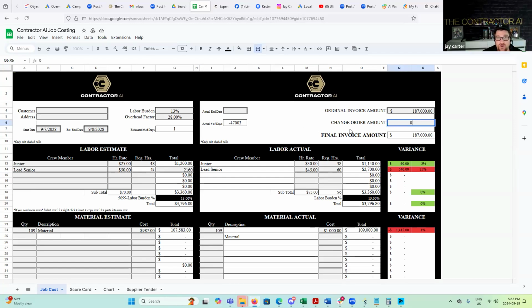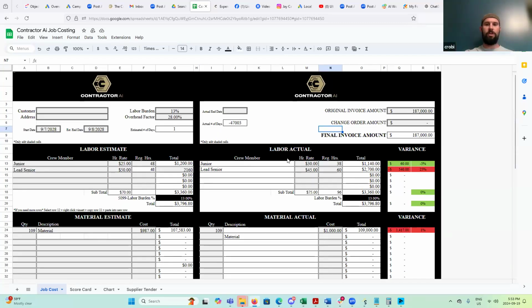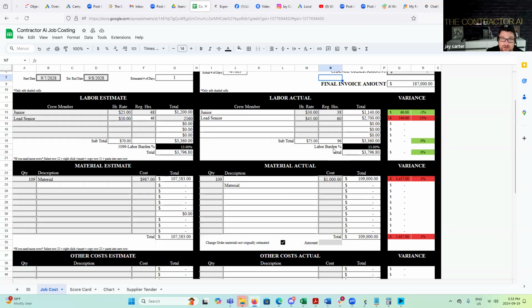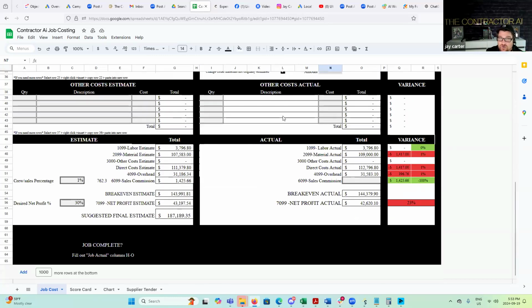Because you want to keep, like, this is a whole other pricing that you always want to know. Like there's some companies that just make their money on change work orders, I swear. Especially in the government stuff, right? So you would fill out an entire job cost spreadsheet just for the change order and then add it to the change order amount. Correct. It's easy to whip one out, and you're going to add in what your change work order was.